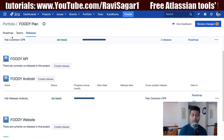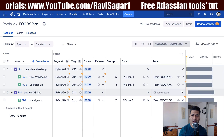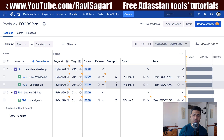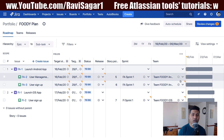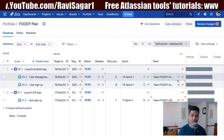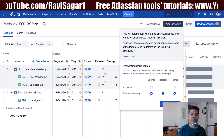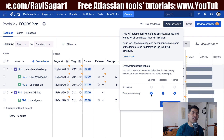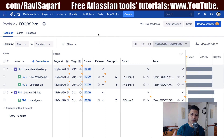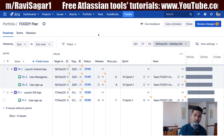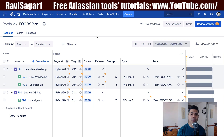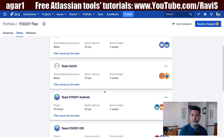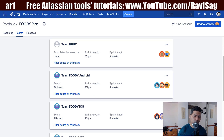Overall, I'm quite satisfied with my plan. I started filling up the plan by assigning stories to releases and making sure the team is filled in, because I want the relevant team to work on those activities. If you click on the 'Auto Schedule' button on top, you can leave the option to override issue values — if you leave it as empty values only, the empty values will be filled in based on the current situation and how much your team is supposed to work.